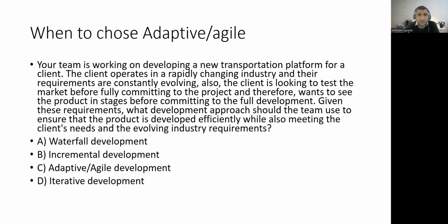So the answer, as Kamar has said, is more towards the scenario, towards the agile. But let's see, we have another option called incremental. So it's certainly not waterfall, right? Because two things are there. The client is looking to test the product in stages before committing to the full development. So they want multiple deliveries, right? If multiple delivery is the case, it's not predictive. One thing is for sure, it's not waterfall.